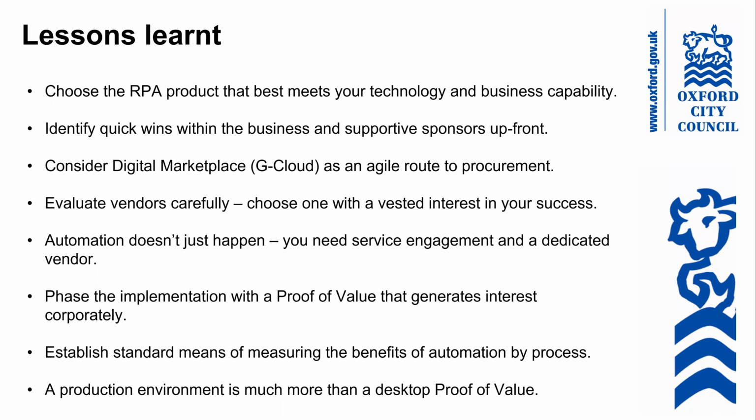And as we move forward, one of the things we are definitely going to do is establish a means of measuring the benefits, the return on investment for each process, because as a result of the positive outcomes of the proof of concept phase, I've now got people clamoring to have their processes automated. And the challenge of that, whilst it's good, is that some or several of the people that are asking for automation of processes are people that have got a very loud voice in the organization. And we know what that means politically with a small p. But equally, they're asking to automate processes that maybe have 3 or 4 or 5 transactions a week, which you really don't want to be doing.